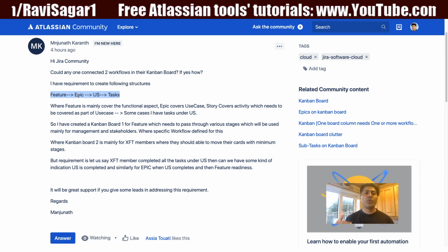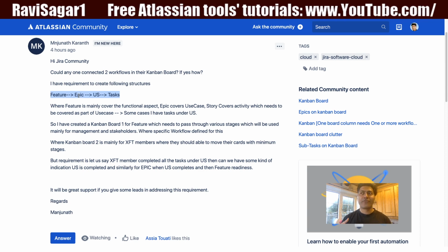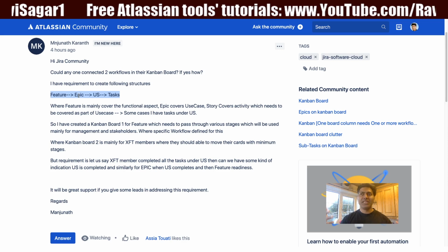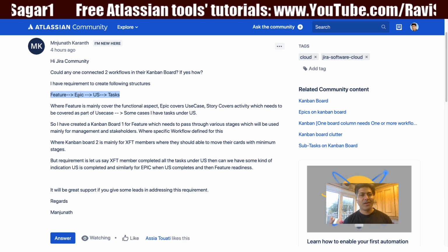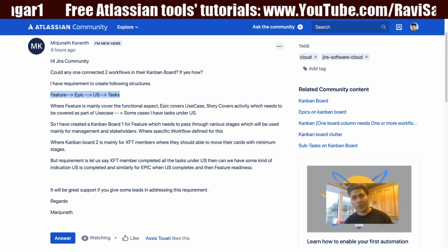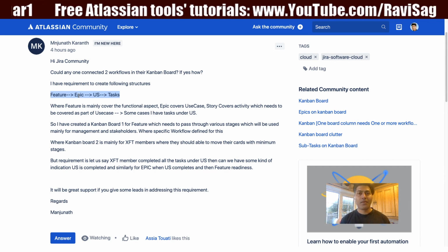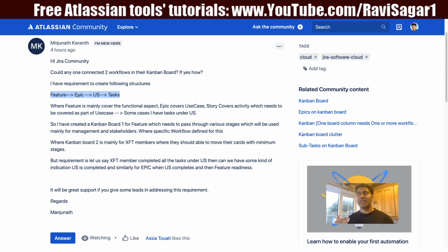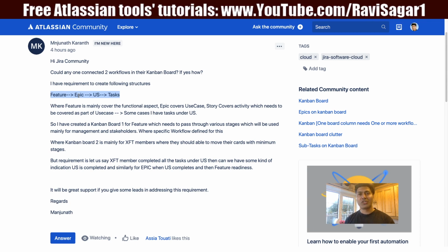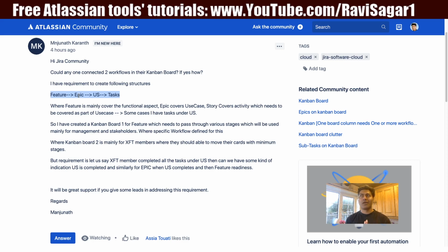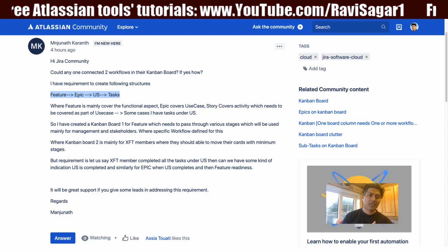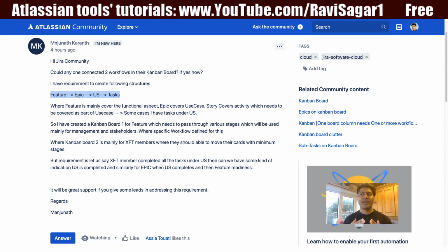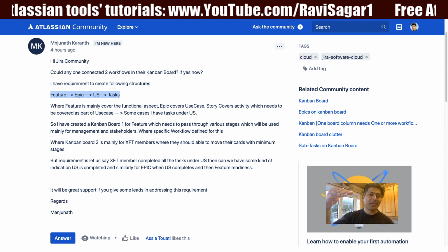But if you're trying to have some indication of, let us say, you want to just match the workflow transitions, it won't really happen automatically unless you do some automation using Script Runner for Jira. And that can be done using the transitions or post functions. So let us say the moment you resolve your task, or maybe all the tasks under a specific parent, you can actually update the parent status. So it can be done.